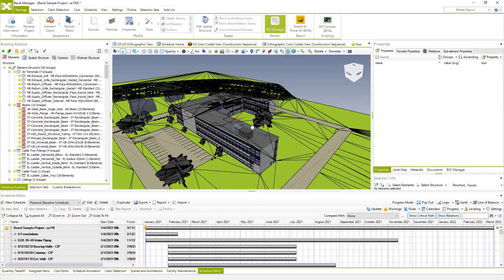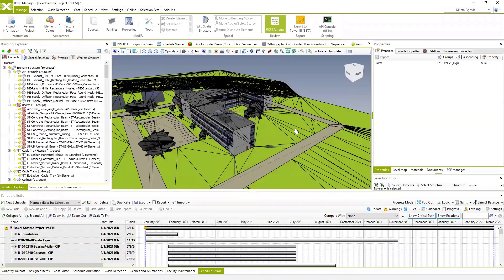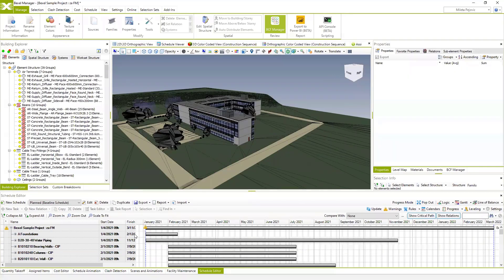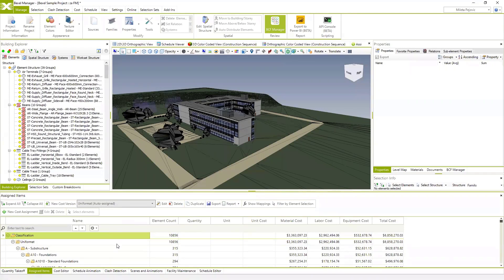I have to mention, because we're receiving a lot of questions about how to integrate and publish information into Power BI: all the information created in Bexel Manager is published in Power BI and you can organize it according to your needs, creating your own templates. But what you have to know is if you don't have the information you want to export, you won't be able to create something useful. So in order to have a full template you have to create your cost estimation, cost classification system, and cost version.